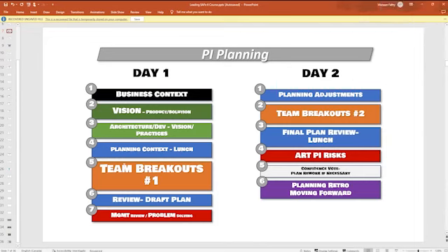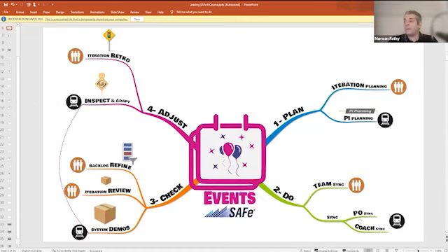Yeah. Last question, from Sally, on the refinement of stories. Look, this is a little bit of an advanced topic, but I would quickly share it with you. When the PM shares the 10 features with the whole ART, those features are of no surprise to the team members. Why? They have heard about them before, in the PO sync that happens on a weekly basis with the PM, and the coach sync between the Scrum Masters and the RTE.